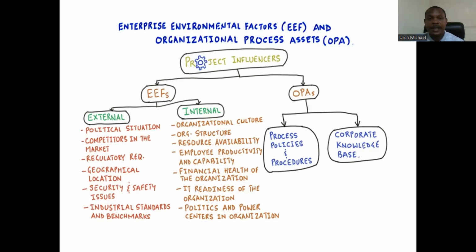Then you have regulatory requirements by the regulatory boards. Are there things you need to obtain permission for? Geographical location, security and safety issues, industry standards, and benchmarks. You have to consider that these are external to the projects.